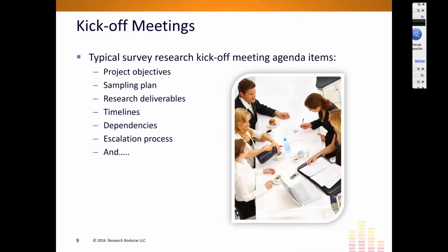Now, as market researchers, one of the things that we typically do when we're starting a new project, including survey research projects, is have a kickoff meeting. I'm sure all of you, or most of you, have attended a kickoff meeting. And these kickoff meetings have pretty standard agendas. Very often we are going to review the project objectives. We are going to talk about the sampling plan. We are going to talk about the deliverables. When the project is done, what's the deliverable going to look like?